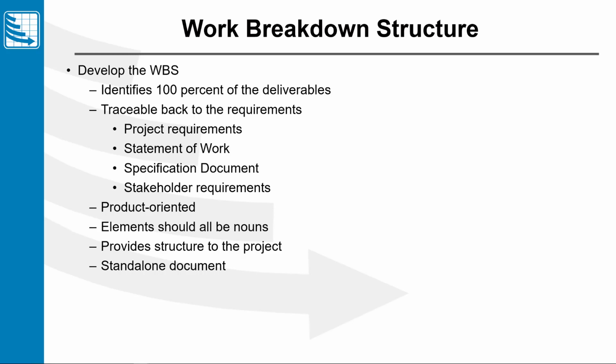We could literally group all of our costs based on this WBS. We're also going to group tasks based on the WBS. So the WBS is really going to form the skeleton of the project. It's the structure of the project. And like I said, it's going to be the structure of our schedule as well.